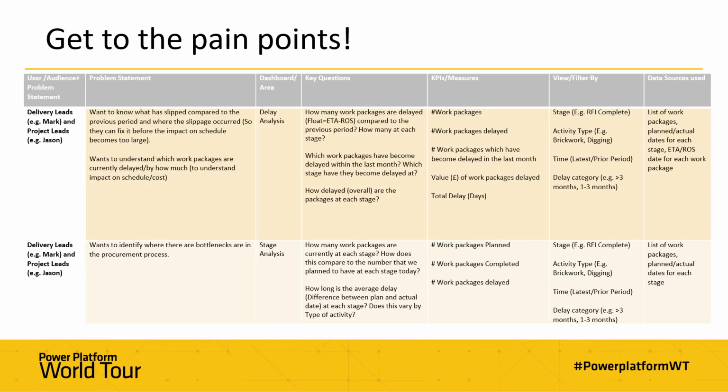And by doing that kind of analysis, here we can see that come through: how many work packages are delayed compared to the previous month, but also which work packages have become delayed within the last month and which stage they've become delayed at.